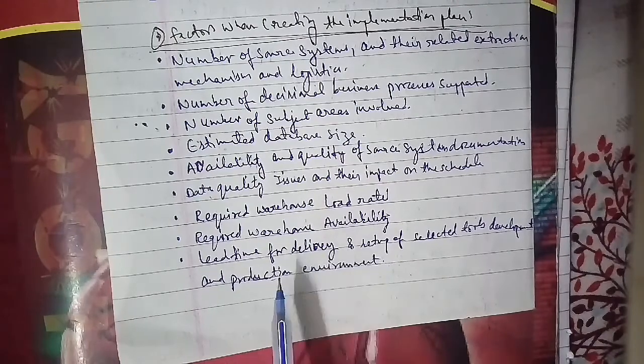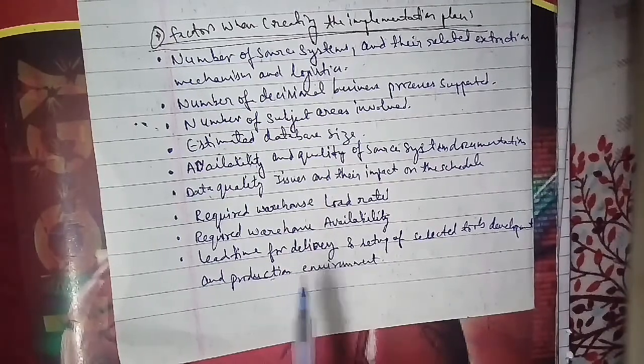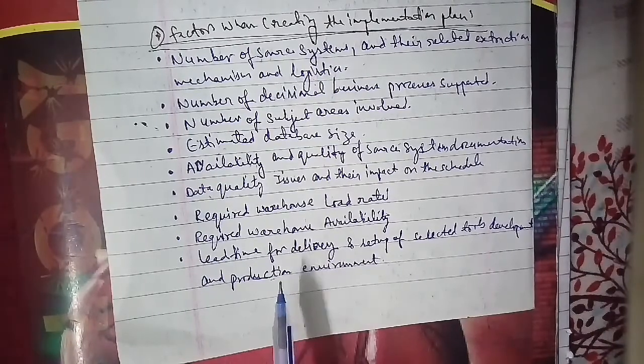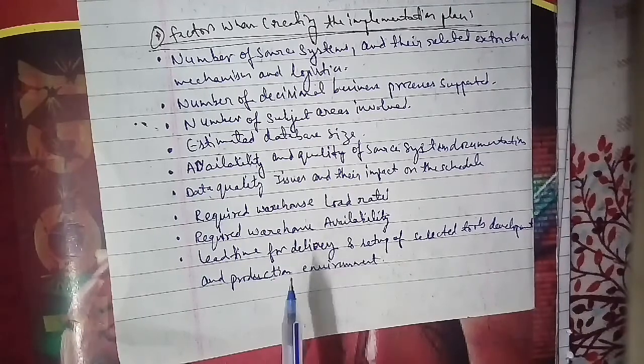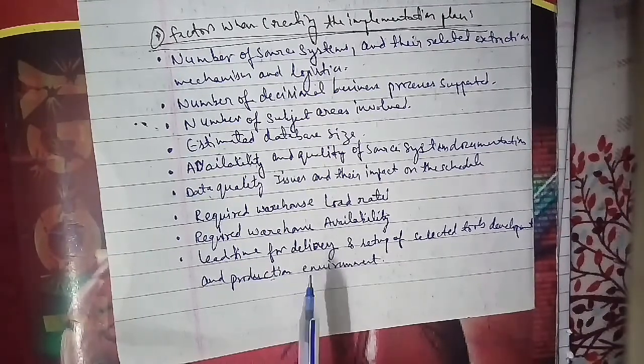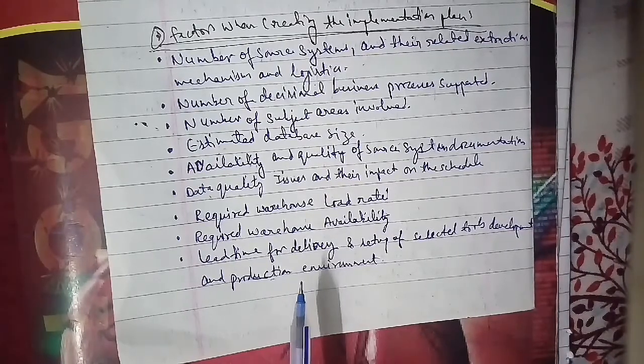While some warehouse implementation tasks can proceed while the computing environment and tools are on their way, significant progress cannot be made until the correct environment and the tool sets are available.